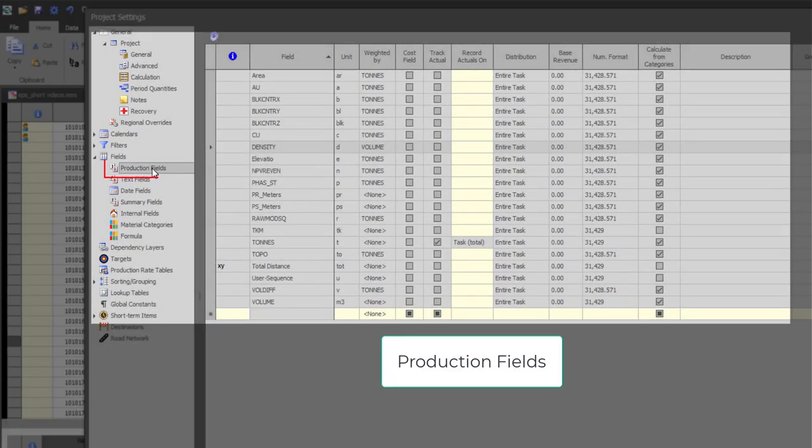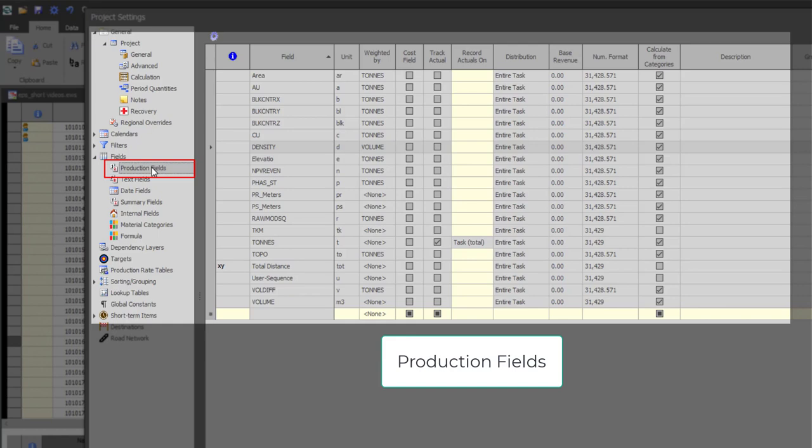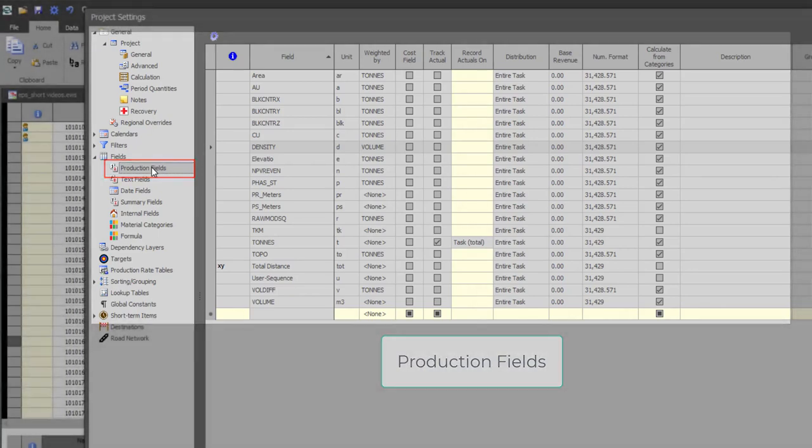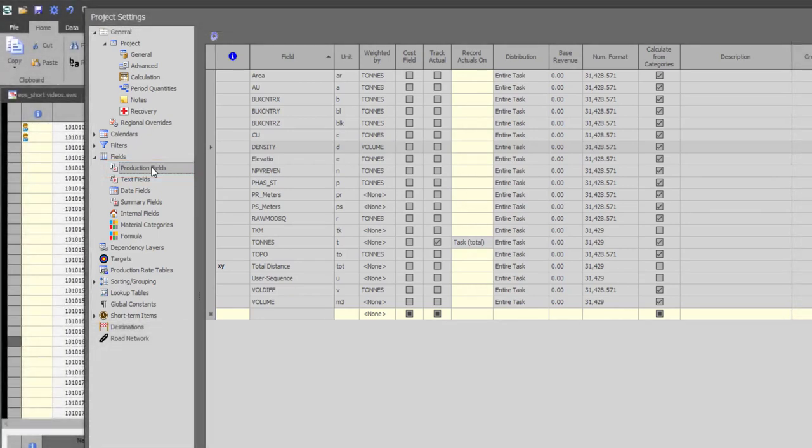Production fields are numeric fields which store quantitative data such as tons, volume, length or grades, cost and revenue estimate for tasks. Most of these fields will come from Studio OP but you can always create calculated production fields using the formula option.